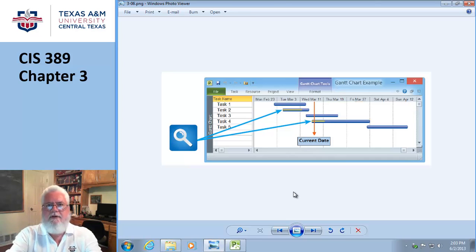Let's pretend this is a construction project, and you're working on a 3-story building, and you've arranged for the roofing material to arrive on Monday, and the crane to lift the roofing material up to the 3rd floor is going to arrive on Tuesday. So everything's cool, and then you get a call saying the crane is stuck at the other job site, and it's going to be another week. It's like, oh man. So yeah. There are very, very tight relationships between these tasks, and rarely do tasks 1, 2, 3, 4, 5 stand alone. They almost all are interrelated.